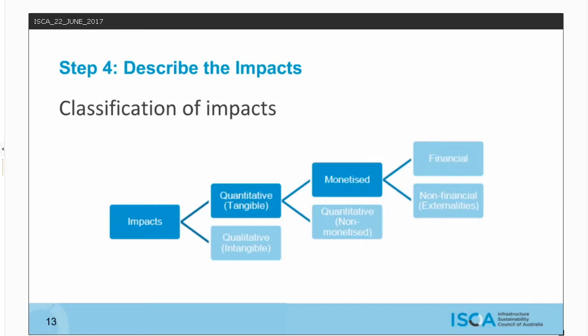When compiling a business case, it is imperative to understand which quantitative metrics are recognised and trusted by the key stakeholders. So refer back to your second step and your key stakeholder drivers, in addition to demonstrating how the options will influence those metrics. Where metrics do not exist and need to be developed, just take a bit of caution. Attention should be paid to variances in the legitimacy or robustness of the metrics selected. When choosing metrics, choose those which can be used to compare the benefits of multiple initiatives, that can be readily linked to broader project, organisational or stakeholder objectives, and can be used for tracking performance of the options once implemented.